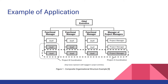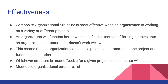A matrix structure would require new construction to occur within one of the maintenance departments, where the project manager would report to a functional manager rather than the executive. The composite organizational structure is most effective when an organization works on a variety of different projects, either simultaneously or sequentially. An organization will function better when it is flexible instead of forcing a project into an organizational structure that doesn't work well with it. This means that an organization could use a projectized structure on one project and a functional structure on a different project, using whichever organizational structure is most effective for a given project.